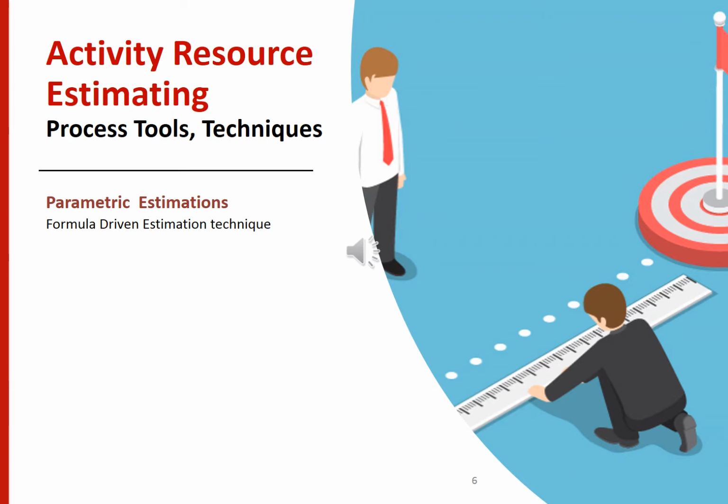Parametric estimating requires you to know some of the basics about your current project so that you can match it up with historical data. First, you need to know how many units you will be producing. This is because you will need to figure out how many hours you will need to produce each of those units from previous projects.